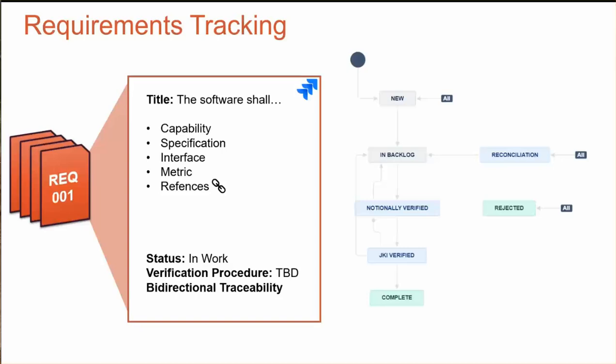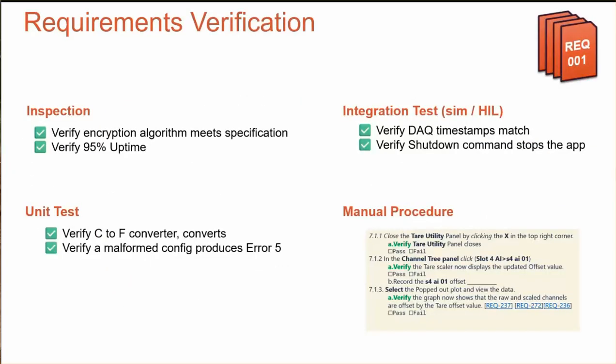And then requirements tracking. In addition to all of those, we have the specific requirements for our project, like you can connect to this device at this rate and read this data with this timing information. And so we had to build out a whole system to track several hundred specific requirements, and then create verification plans that would say, okay, some rules you have to verify through inspection, or you can verify through unit test.